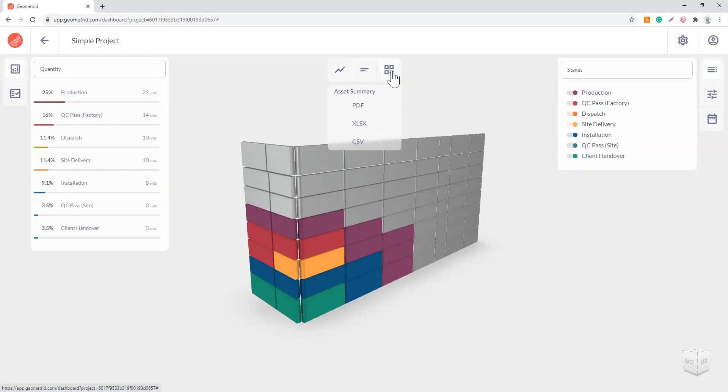This is the list of QR codes you can download in PDF, Excel, and CSV as well. It usually starts from downloading the QR codes and passing it on to suppliers and teams or subcontractors that would then paste the QR codes on the building elements and then report for each of these stages based on these QR codes.